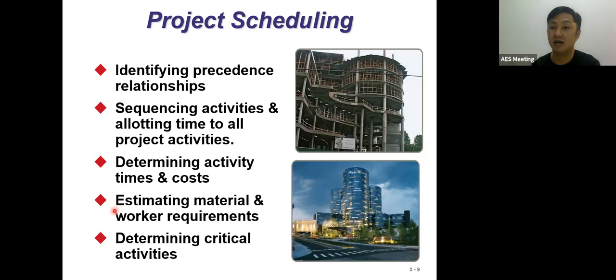And eventually, the last one here, we try to look for the critical activities. Critical activity means that the activity is very important. The activity, as I mentioned, will determine the final project duration. So a delay in those critical activities will delay the project.